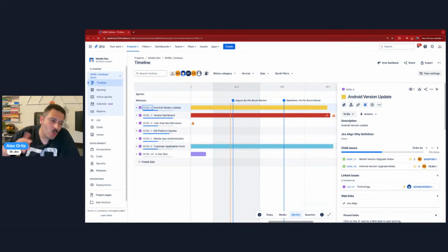And when we go into the backlog, you're going to see what powerful role they play over there as well. I already told you that these epics are rankable, which basically means your product managers can tell you, hey, Scrum Master, this is the order in which these epics, and thus by association the stories, should be completed in. So they basically give us a cheat code for what needs to be planned into a sprint. And so these epics, again, very, very powerful things.